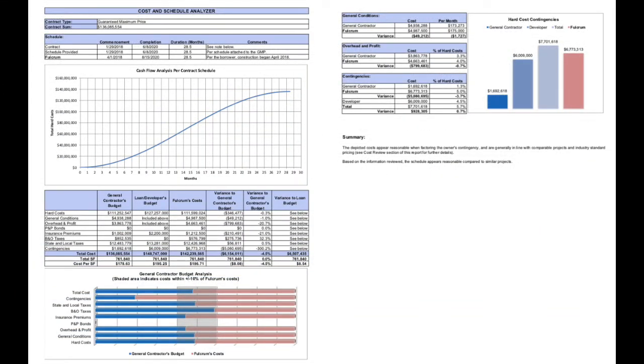A plan and cost review generally provides the owner with an overall risk assessment that evaluates various construction health factors of a particular project during the pre-construction stage of a real estate and construction lifecycle. These health factors typically relate to time, quality, and costs. Keying into the costs of a project, Fulcrum utilizes its cost database to compare comparable projects in evaluating the general health or reasonableness of the costs for a particular project.